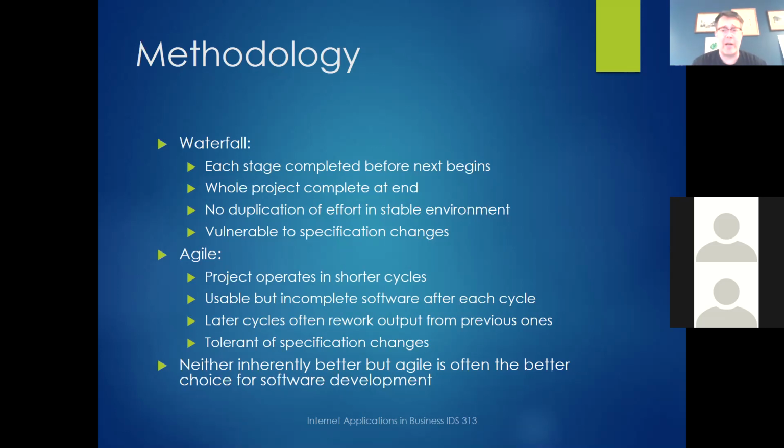So the agile methodology, essentially, your project operates in shorter cycles. So it's going to be the same sequence of things in the waterfall method, but it's going to be smaller parts of it. For example, in the first step, you might design the core of the application, right? It won't be pretty. You won't have those wonderful aesthetics or snappy graphics, but whatever your application is supposed to do, for example, maybe you have some kind of data analytics application. You want to make sure that people can upload a batch of data and perhaps run a couple simple tests on it and display those results, right?